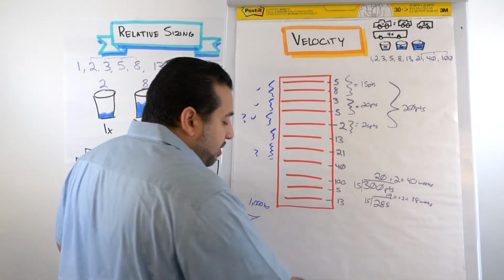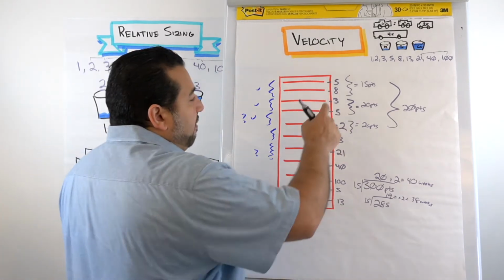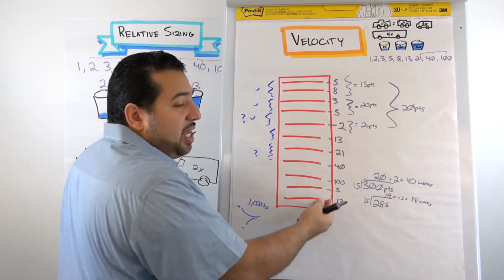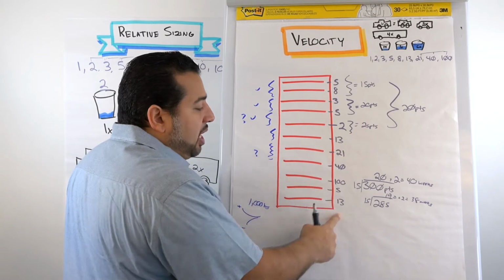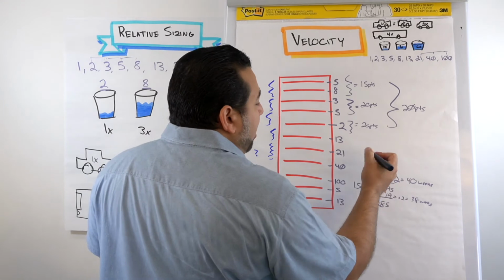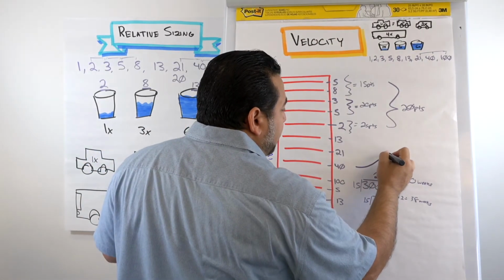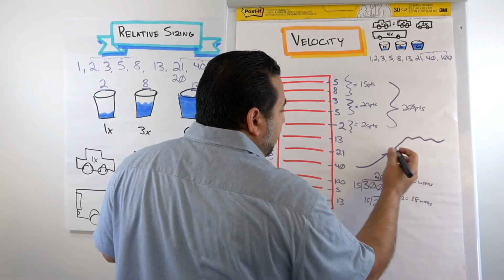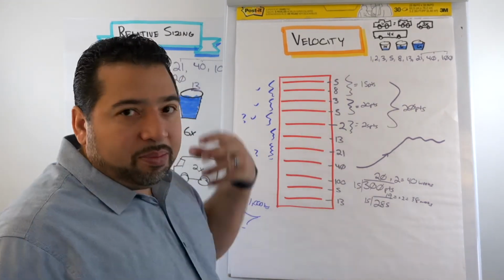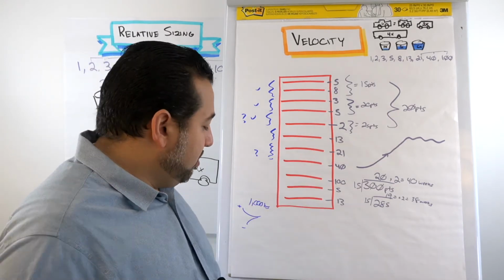The other way is if it's relative size to each other. Then as we get faster, get better with the product, and understand more, we're going to be able to do these items faster. We do not have to resize these points because they were relative already to begin with. That means we're going to be able to pull more work into the sprint. Our velocity is going to increase, and eventually it starts to stabilize. As we get smarter and smarter, we're able to pull more work in, so I don't have to have the team go back and resize all these items.